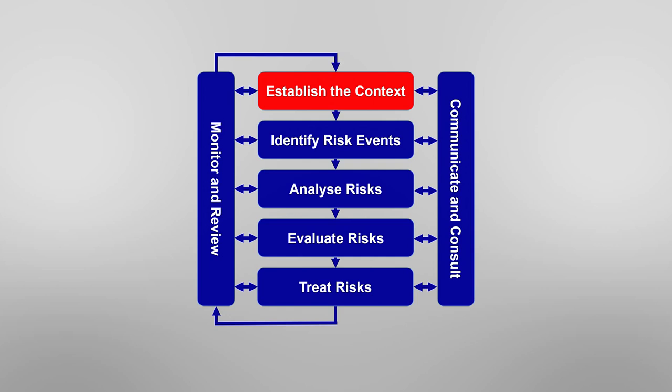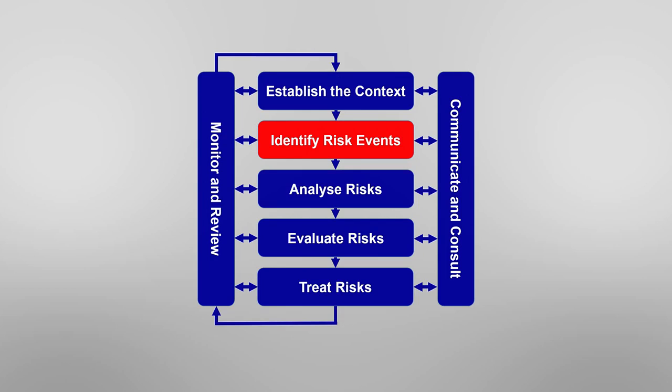Once the context is set, then you identify the risks, which are actually called risk events. This is usually achieved by brainstorming in a group setting or considering the risk events in other similar projects. Once those risk events are identified, we have to analyse them.